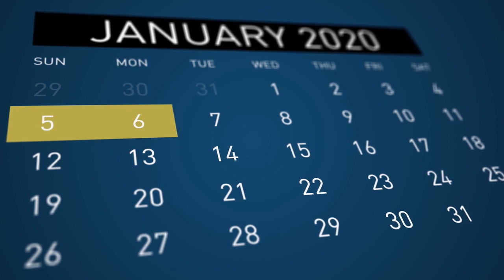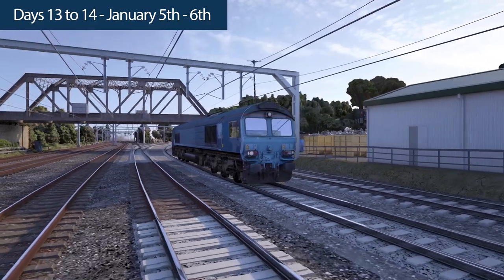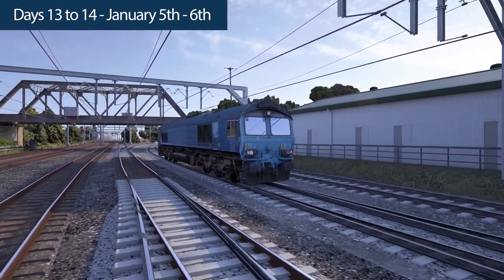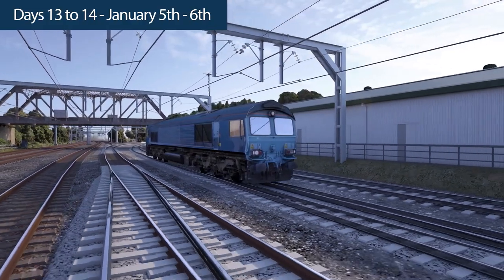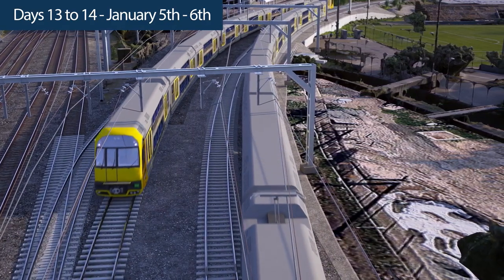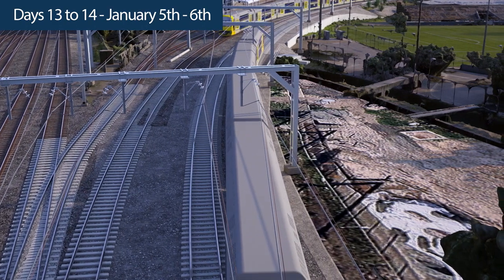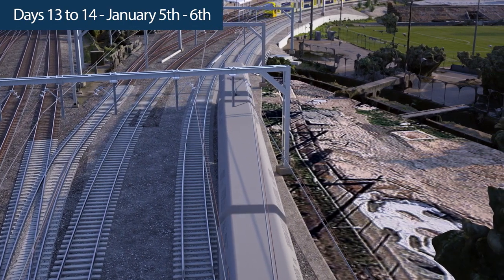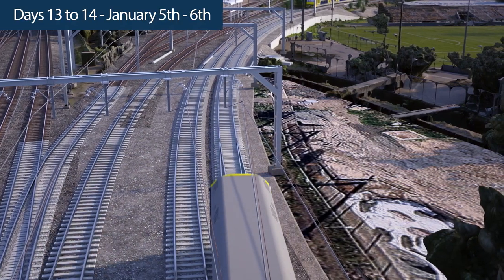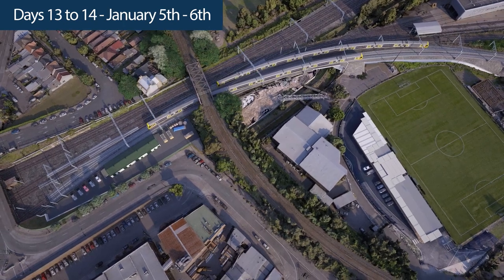It also incorporates the aspects from the Illawarra locals to the Illawarra mains, which will occur during midnight to 4 a.m. The final hours of testing will incorporate the live locomotive testing to finalise design integrity testing and complete ATRIX testing. A test permit will be taken to carry out section proving of the OHW 1500 volt in advance of handing back the possession. At 0200 hours, the Sydenham Junction remodelling and commissioning of the new signalling system will be complete. Train services will now travel from the Bankstown Line onto platforms 3 and 4.